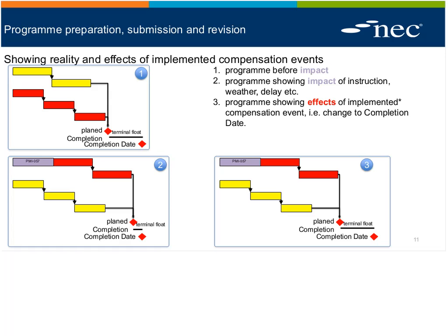Yeah, I use the language shoving: shoving the compensation event onto the pricing document, the actual schedule or bill. So implementation has got nothing to do with the progress of those compensation event works. Implementation means it's either had an accepted quotation, it's been deemed accepted through a lack of correspondence, or the project manager has performed their own assessment and notified it. So it's the closure of it as a compensation event.